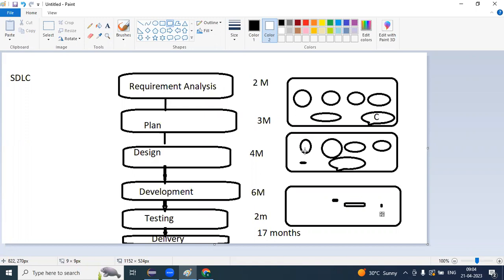What is the meaning of done in case of agile? Everything is complete. Ready alone is of no use. Okay, what is done? Done in the sense, requirement understanding is done, design is done, plan is done, development also done, testing also done, then only you can say that the requirement is completed or in the done state.